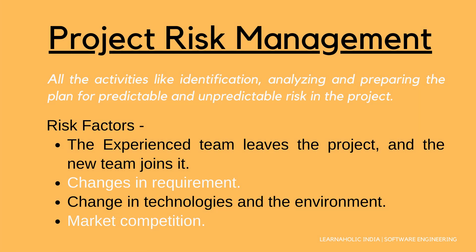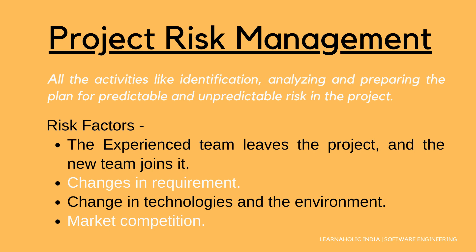After project resource management, project risk management comes into the picture. Risk management consists of all the activities like identification, analyzing, and preparing a plan for predictable and unpredictable risks in the project. Several risk indicators include experienced team members leaving and new teams joining, changes in requirements, changes in technologies and the environment, and market competition.